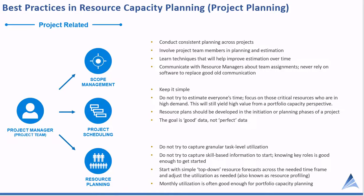Keep it simple — don't try to estimate everyone's time. Resource plans should be developed in the early phases of the project. The goal is good, not perfect data. Don't try to get perfect data because it's likely never to happen. I could tell you stories about leadership teams that questioned the data and killed their portfolio management implementation simply because they were expecting perfect data when they already had good enough data they could have acted on. Don't capture granular or task-level utilization — save that for when you're far more mature and can utilize it successfully.